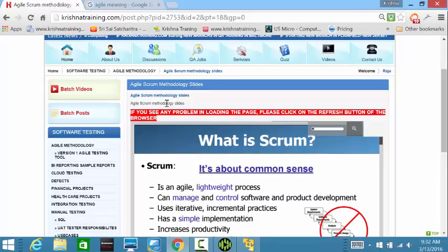So if the effort done was, let's assume, 100 hours, we need to apply another 30% of 100 hours in rework effort for developing this requirement gap, doing the coding and testing, and again moving it back to user acceptance testing. So the initial estimate of the project was probably 11 months. Now it got shifted to probably 12 or 13 months. Now when they shift that project, ultimately it's a cost.